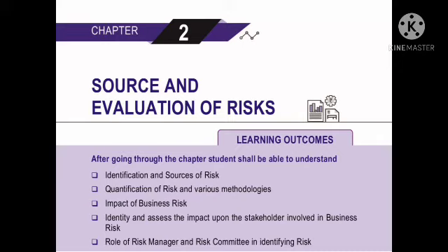The levels of risk impact can be assessed across the following stakeholder levels. Number, stakeholders, nature of impact. 1. Owners, boards: failure to achieve objectives, delays, change management, management disruption, financial losses, etc. 2. Society: loss of confidence, health hazards, direct or indirect financial losses, disruption in lifestyle, etc. 3. Consumer: health, financial losses, loss of confidence, etc.